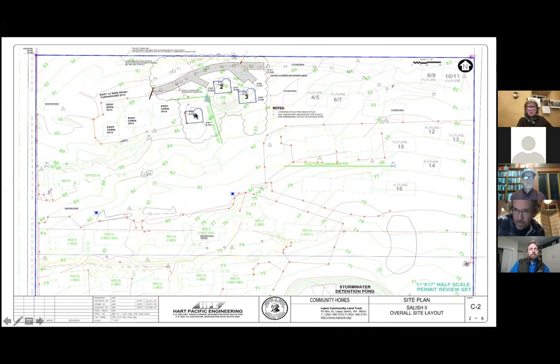And if it's less than a quarter acre and it doesn't have more than 5,000 square feet of impervious surface, you will find yourself with much fewer and much less expensive stormwater controls than if you were to do this whole thing. And I would just bet if you were to try and develop all of this at once, your stormwater alone would cost you a couple hundred thousand dollars easily.